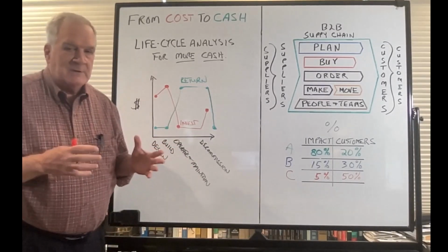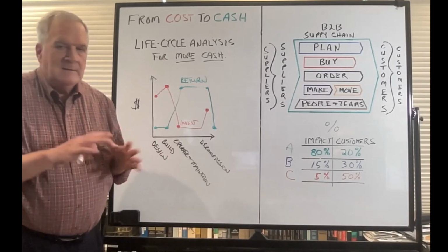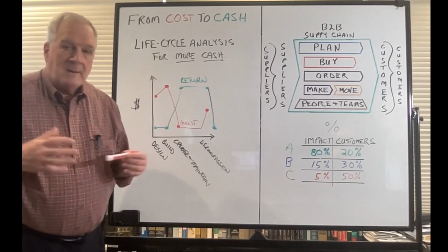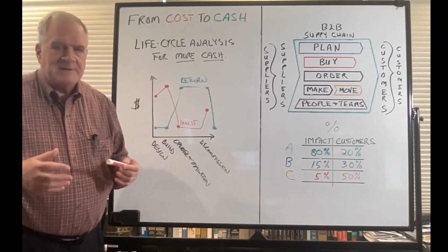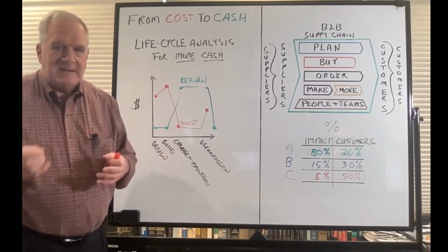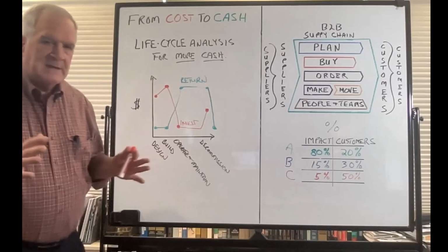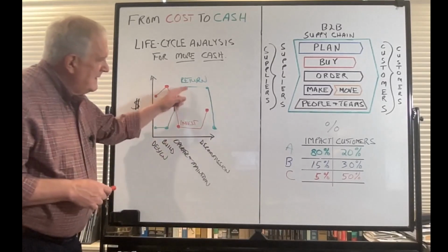And if it didn't contribute to operate and maintain consistently, safely, efficiently, it didn't happen. And we were able to strip out several $100 million of capital projects, investments, people-related costs, contractors, design engineers, etc., in order to get the cost basis of that plant down to where they could be competitive and generate their target return.